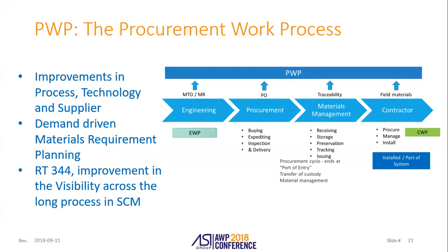Last year we discussed what the procurement work process is all about. As Glenn mentioned, we've moved away from the definition of PWP as a 'procurement work package' — when people are looking for a package, that isn't what's being created here; it's a report and a process. In May 2018 we formally announced PWP to be used as the 'procurement work process' term, and not to expect an additional package beyond the three packages everybody's familiar with.